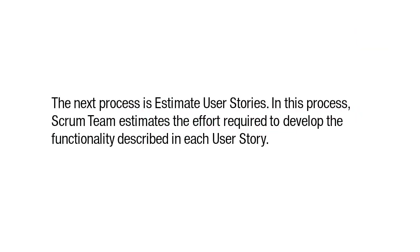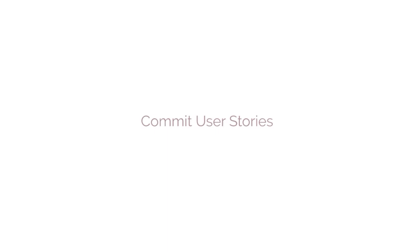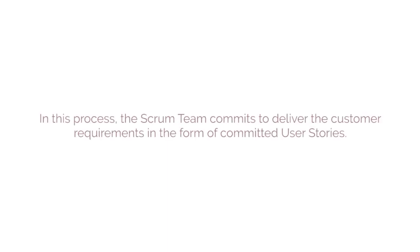The next process is Estimate User Stories. In this process, the Scrum Team estimates the effort required to develop the functionality described in each user story. The next process is Commit User Stories, where the Scrum Team commits to deliver the customer requirements in the form of Committed User Stories.